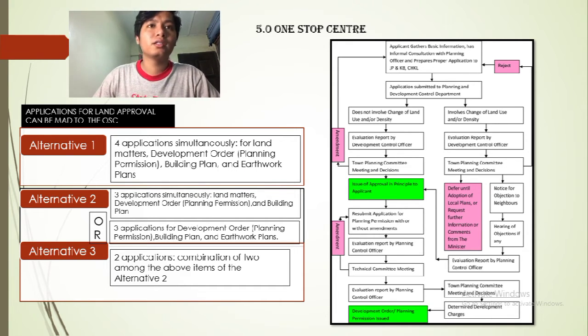So next is the step of the process of the land application approval at the OSC. I will explain more easily about the application of the land approval process. So when the client application is received by the land officer, the file is registered, and the next step is to submit to the Administrative and Diplomatic Service Association. Then it is referred to the technical department for comment.